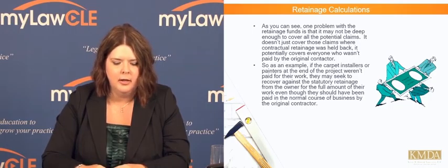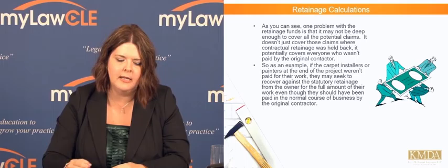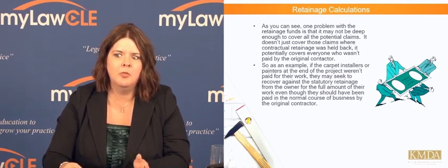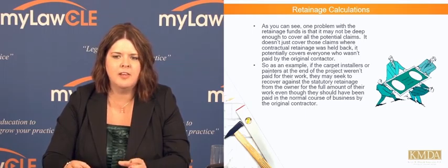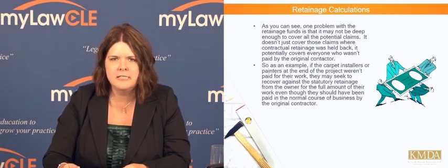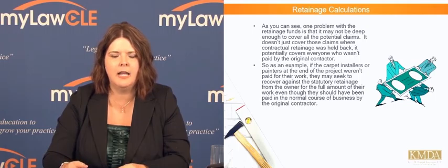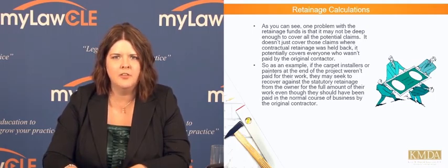And it's always suited us well. Also, you will see when you start filing liens and doing a lot of them that you will come up with ways to try to make it easier on you. A lot of the lien deadlines and rules say that you have to send a copy to the GC or the owner within 5 days or 7 days of filing it. Well, we send it simultaneously with filing it.